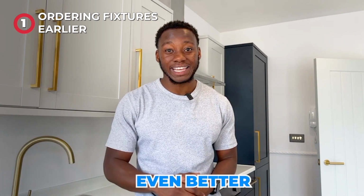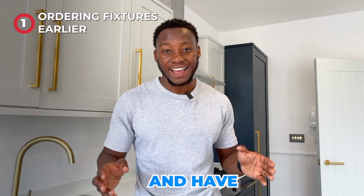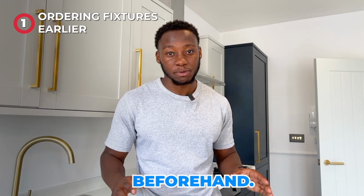So definitely even better if I order my second fixtures a lot earlier and have my design finalized beforehand, so that I can just order it as soon as we are ready and ahead of time, so that when the contractors are in, they can get straight to work.